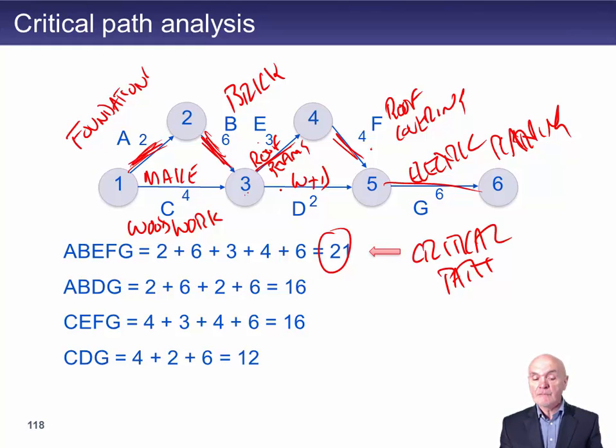So it would. And maybe what you can do sometimes, depending if the skills are interchangeable, is this: if you see putting on the roof beams is going a bit slower than you'd want, maybe you can take a joiner off doing the windows and doors and move that person across to helping with the roof beams. So it definitely takes only 3 days, and it won't really matter if putting in the windows and doors takes 3 days instead of 2 days.